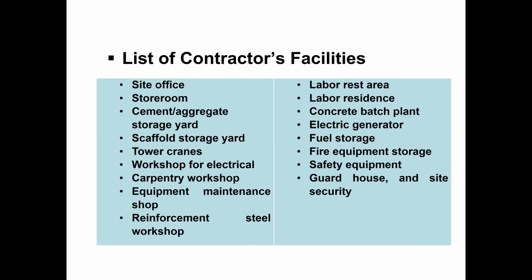Usually, if there is a tall building project, we can install the tower crane with the lift for the high-rise building in the middle. Where we should have maximum access depends upon whether there is one tower crane or more than one. So how can we give access for delivering our materials.